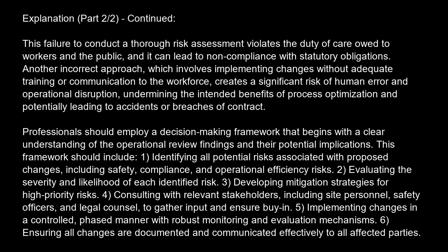Identifying all potential risks associated with proposed changes, including safety, compliance, and operational efficiency risks. 2. Evaluating the severity and likelihood of each identified risk. 3. Developing mitigation strategies for high-priority risks. 4. Consulting with relevant stakeholders, including site personnel, safety officers, and legal counsel, to gather input and ensure buy-in. 5. Implementing changes in a controlled, phased manner with robust monitoring and evaluation mechanisms. 6. Ensuring all changes are documented and communicated effectively to all affected parties.